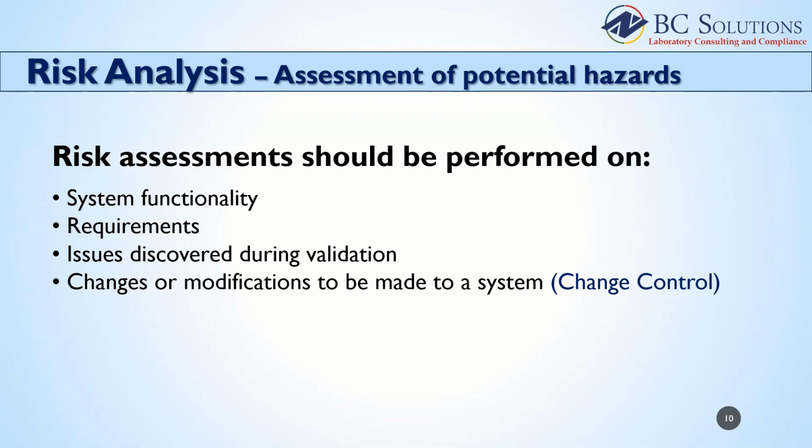Full validation across software functionality is generally recommended for code version upgrades, especially if you are making global changes to your software or taking enhancements. You will want to carefully review vendor-supplied release notes and perform risk assessment on changes that apply to your facility processes. Version upgrades may also have an impact on your requirements and requirement risk analysis. Be sure to review those before you begin.